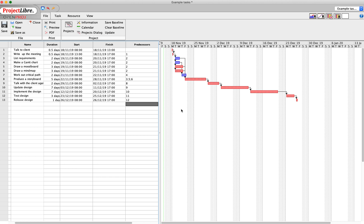So there you are. That's my project. Starts on the 18th of November, starts on Monday, and it will finish on Boxing Day.